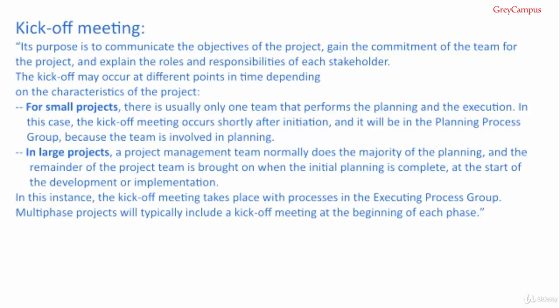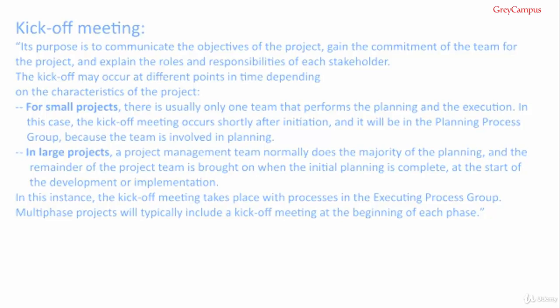In large projects, a project management team normally does the majority of the planning, and the remainder of the project team is brought on when the initial planning has been completed, at the start of development or implementation. In this instance, the kick-off meeting takes place within processes in the executing process group. Multi-phase projects will typically include a kick-off meeting at the beginning of each phase. And this kick-off information, I think you will find, could turn up on the examination.